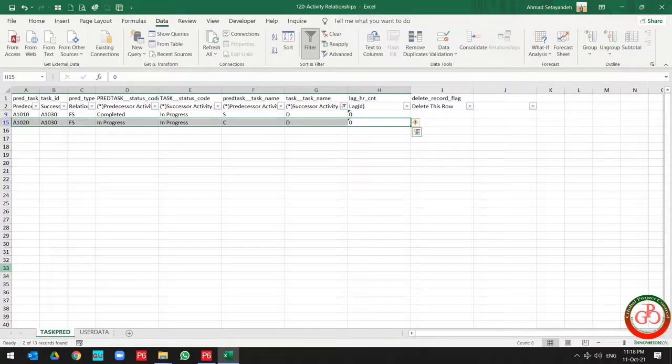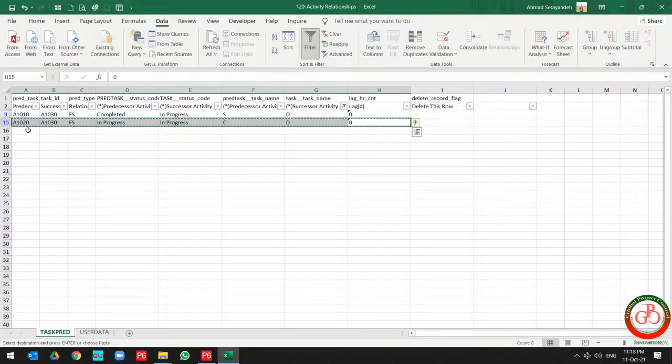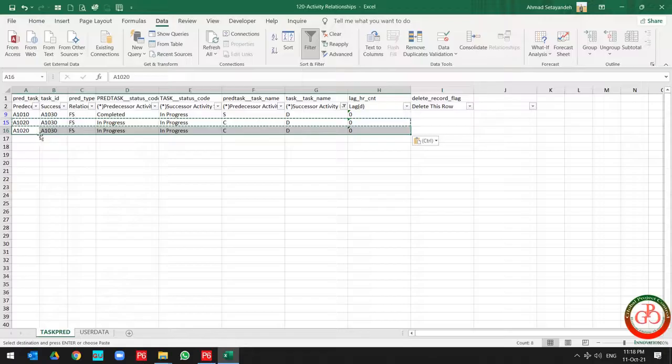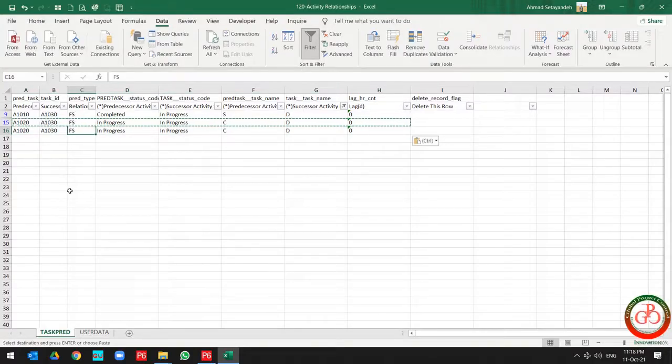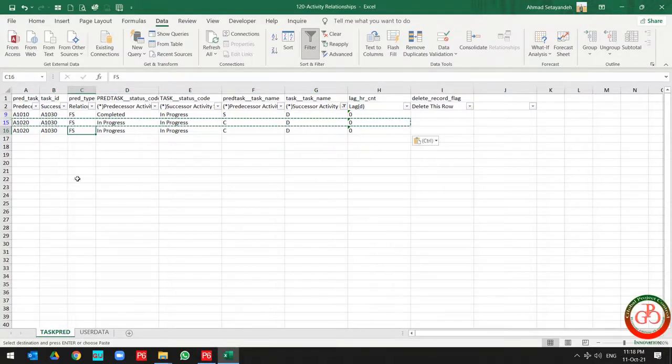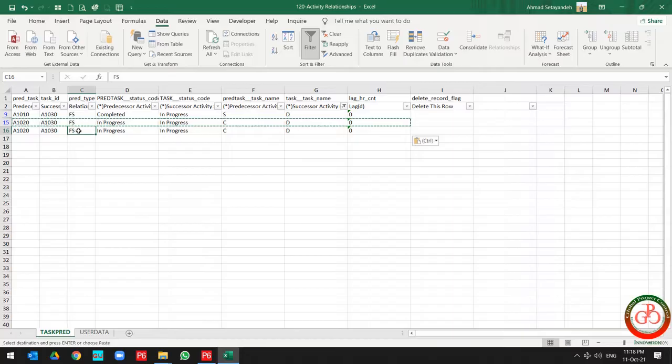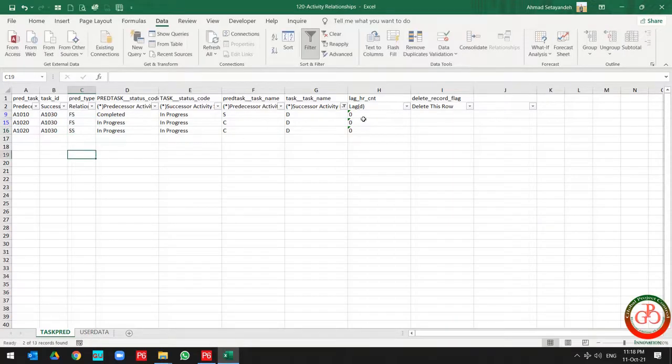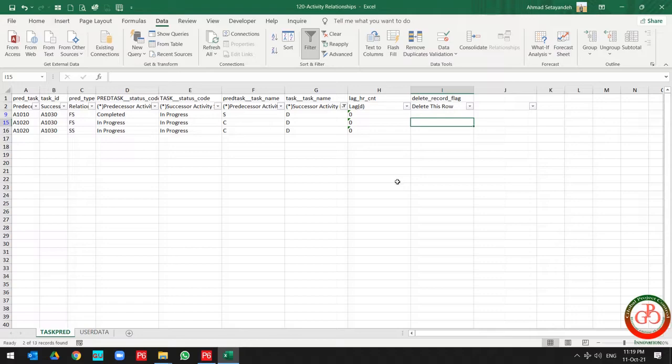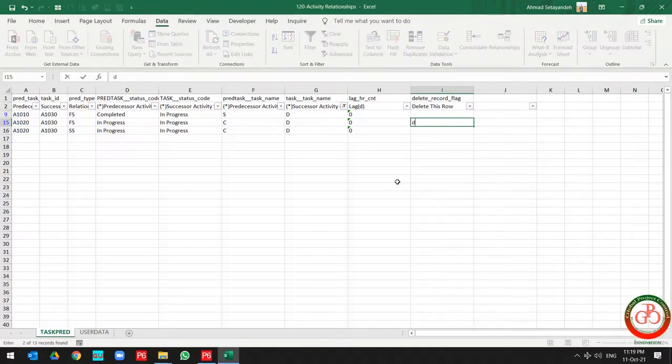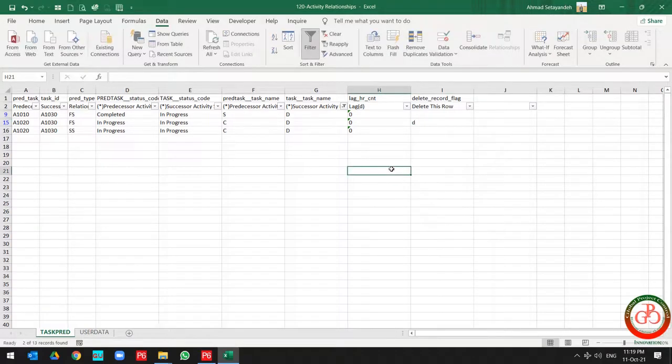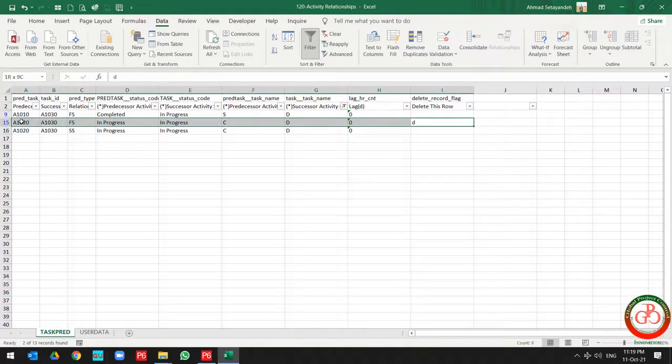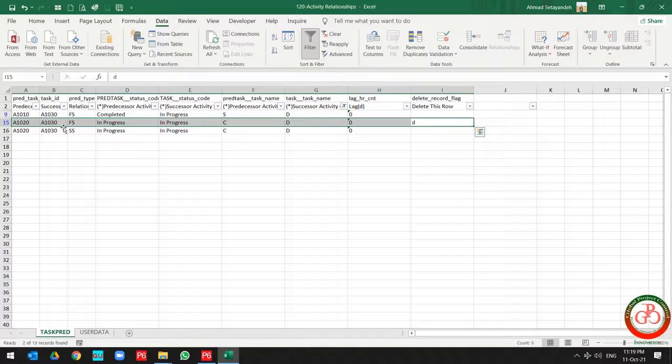You need to copy this information and paste it again. Then change the relationship type from finish-to-start to start-to-start, and for this item you can use the character in order to remove this item from the database of the project on the relationship.